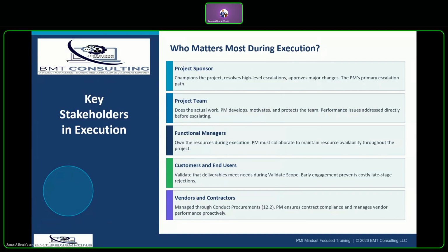Your project sponsor. Your sponsor's role during execution shifts from the authorizer of the project to the executive champion, right? The PM should keep the sponsor informed through regular status reports and escalate issues that exceed your actual authority as the PM, right? So a primary principle here is don't let surprises reach the sponsor. They should never hear bad news from someone other than you as the PM.